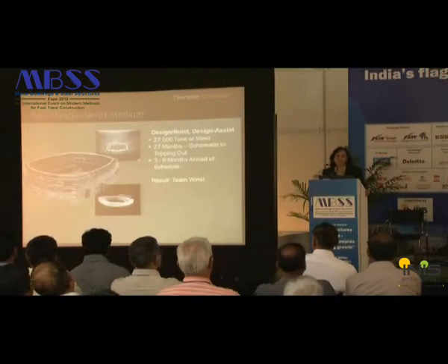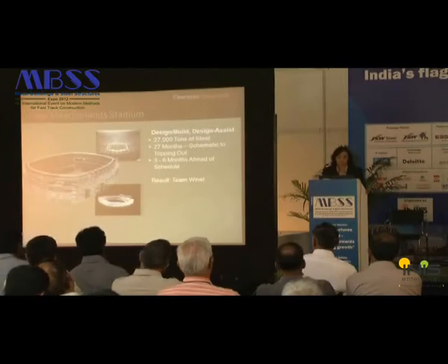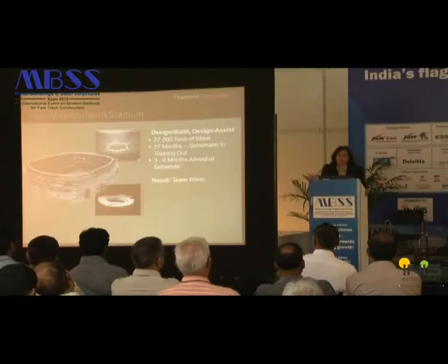And when steel is ahead of schedule, there is a huge benefit because usually the steel and concrete is leading, because that's the first shell, the first thing we have to build. And that means if there are any other delays in any other trades, and steel is 6 months ahead, you have breathing room to accommodate other changes, other delays. If steel gets delayed by 6 months, all you are going to face is delays and delays and more delays.